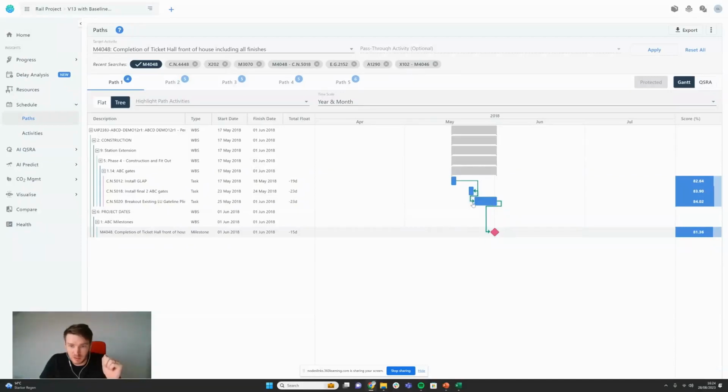There's an activity straight behind it. And then this is a finished start here, but this is a finished start as well. We'd look to see if we can compress this gap. Whether or not we can compress this gap, I don't know. I don't know this project. This is for the individuals on the project to advise if this is possible.